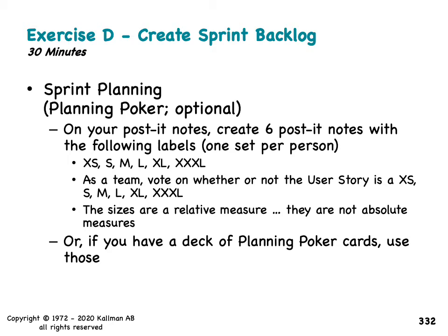Eventually, you'll get to the point where you can start looking at if the team has gotten to the point where they can actually consistently break down their work to bite-sized chunks that are consistent. You can almost do away with points and just do it based on product backlog items and create the charts from there.